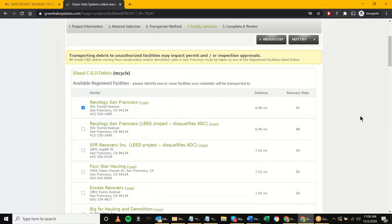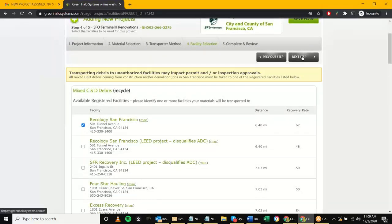James adds: the system will perform the calculation for the contractor and for you. It calculates — for example, 100 tons recovered at 62% equals 62 tons recovered; another 100 tons of concrete recovered at 100% equals 100 tons recovered. It will generate the diversion/recovery rate and caution the contractor that they are not building a plan reaching the minimum rate — whether you raised it to 75%, 85%, 100% — and tell them to go back and source-separate more material.